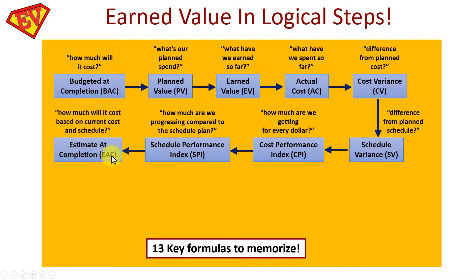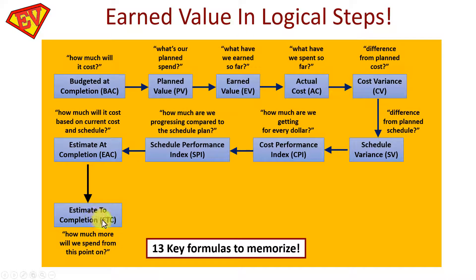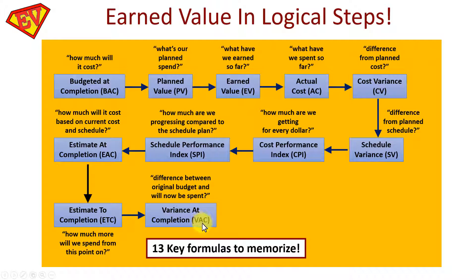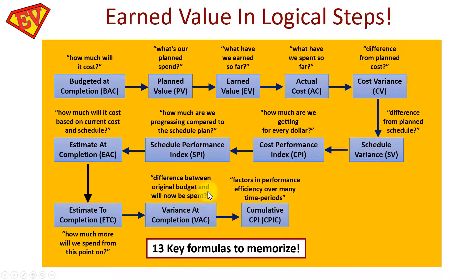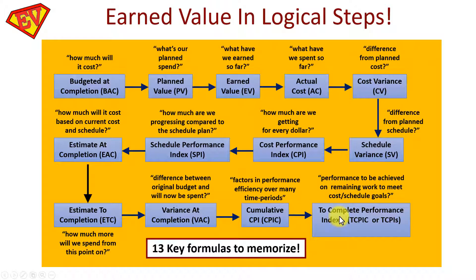Next is the Estimate at Completion (EAC): how much will it cost based on current cost and schedule — one of the first forecasts. Then the Estimate to Completion (ETC): how much will be spent from this point onwards. Then Variance at Completion (VAC): the difference between the original budget and what will now be spent. Next, Cumulative CPI factors in performance efficiency over many time periods. Finally, the To Complete Performance Index (TCPI) refers to the level of performance needed on remaining work to meet cost or schedule goals.